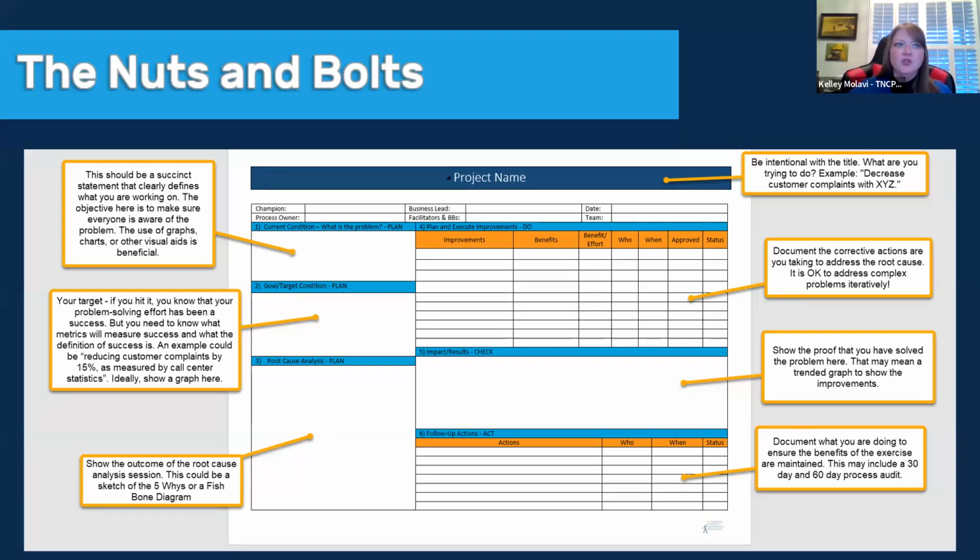So you're going to have those follow-up actions. Again, you're going to have clear owners of that. A tip for the road, there should be one owner for each of these, both the improvements as well as the follow-up actions. When you start getting multiple owners, you end up with, well, I thought they were doing it, and I thought they were doing it, and I'm waiting on them to do one piece while I have this other piece.